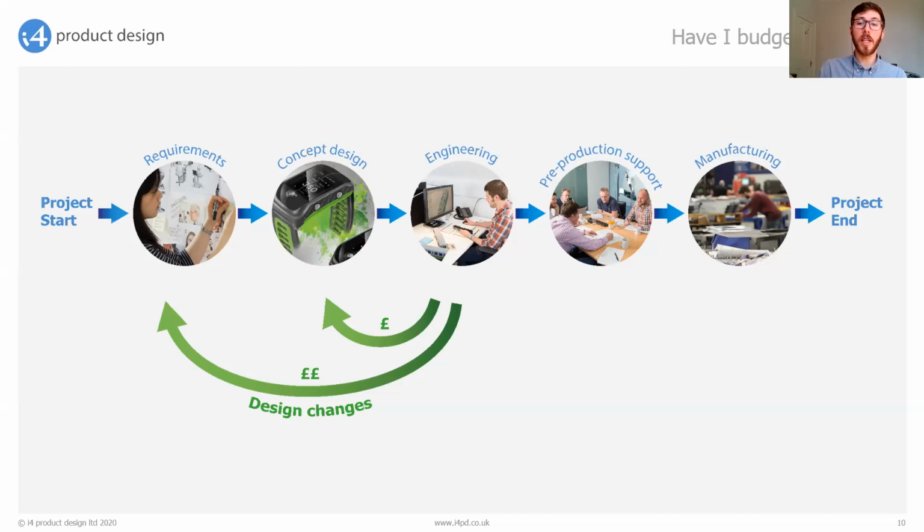When briefing the consultancy, make sure you are clear on what you expect of them. For example, who is to produce the assembly drawings, who is to undertake the design refinements during production sampling, and produce the test rigs. Unless otherwise agreed, it is generally not something that the manufacturers throw in for free, and it is a cost you will have to bear, and the design consultants should quote for it if you're not doing it yourself.